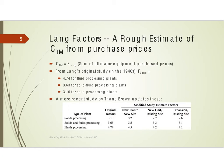What you do is simply take the sum of all of your equipment that you're going to buy and multiply it by one of these factors. It's 4.74 if everything is a fluid, it's 3.1 if you've got solids, and if you've got a mixture of solids and fluids, it's 3.63. It's going to cost a little bit more to install things with fluids simply because you've got to worry about leaks and those kinds of things.